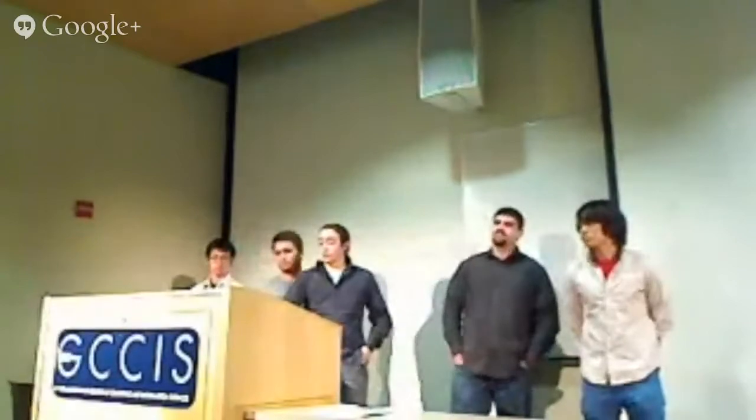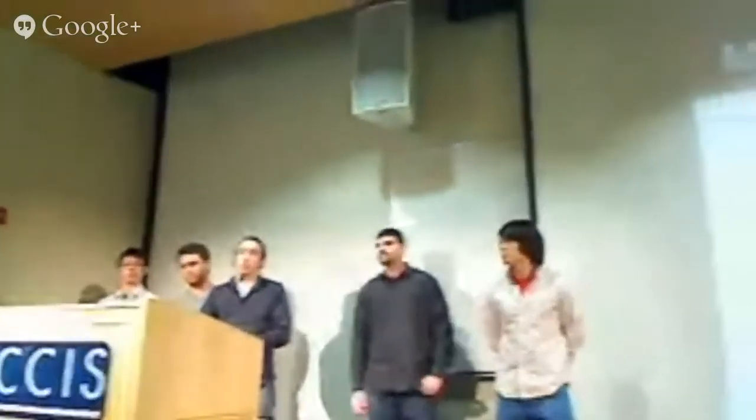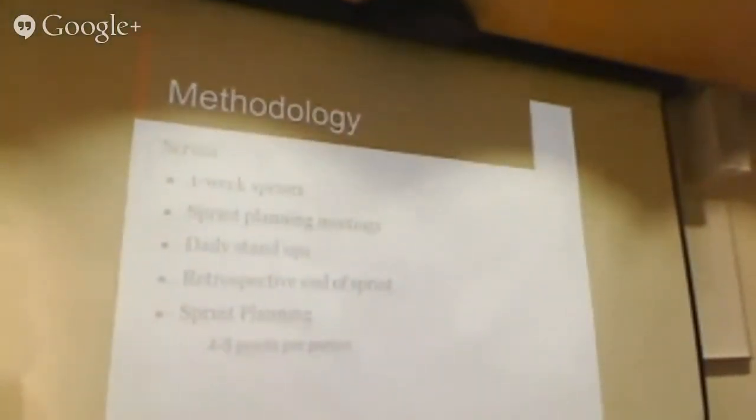So as was kind of alluded to, we did not have the most stable requirements up front, so we decided that Scrum would probably be a good fit for us. It would allow us to start with what we had and create a basic system on which we could spend time iterating, developing, and refining, so that it would be closer to what the sponsor wanted.